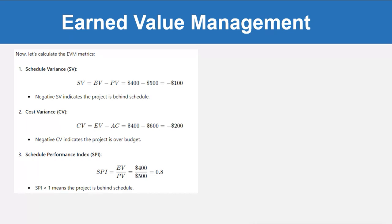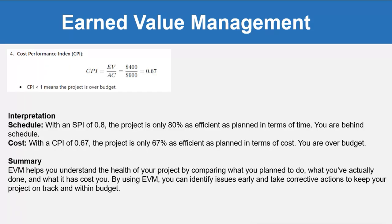Schedule Performance Index: SPI = EV divided by PV = 400 divided by 500 = 0.8. Since SPI is less than 1, the project is behind schedule. Cost Performance Index: CPI = EV divided by AC = 400 divided by 600 = 0.67. Since CPI is less than 1, the project is over budget.